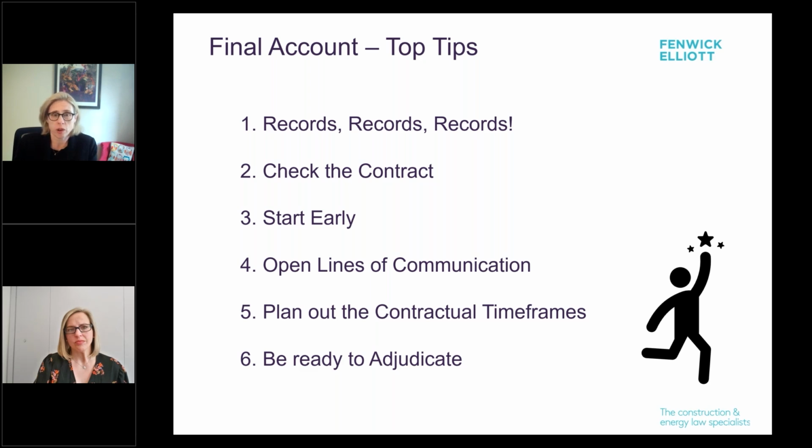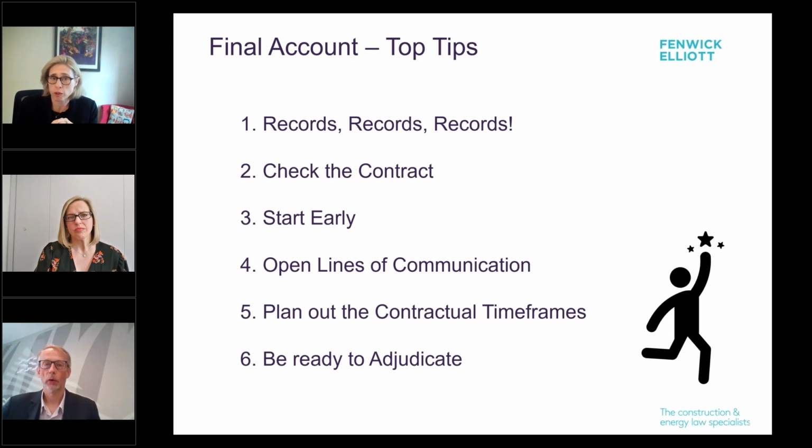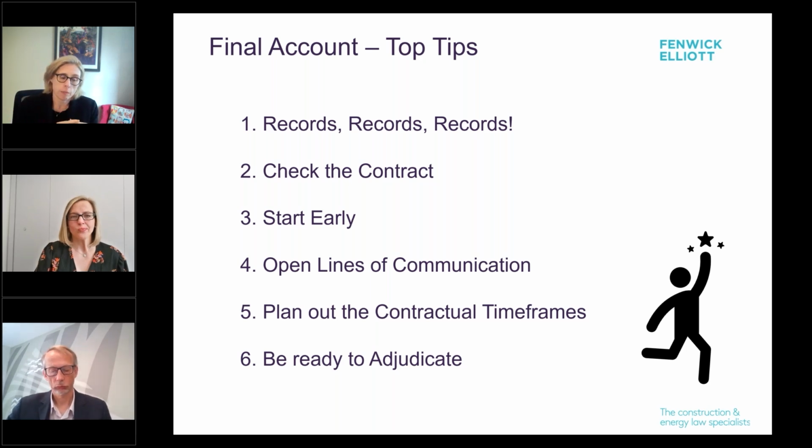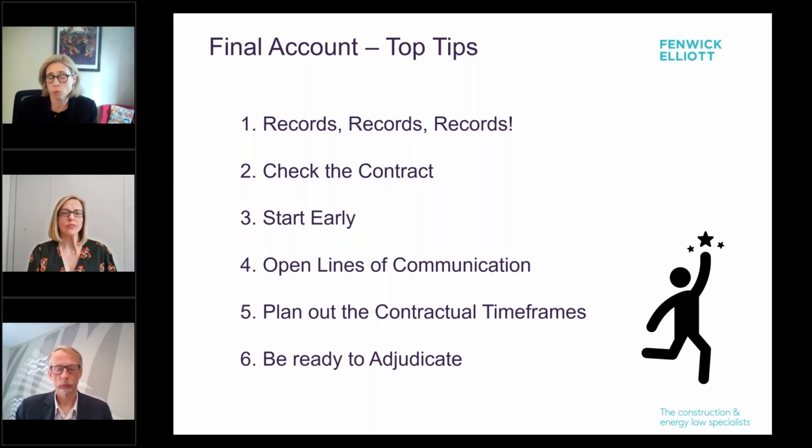Plan out your contractual timeframes. So Katherine's obviously set out the JCT ones that you need to be really aware of. NEC equally, there are strict deadlines and they will be enforced by the courts. Plan those out, be ready for them. And then number 6, be ready to adjudicate. Now, obviously, nobody wants to adjudicate. We're all hoping we won't have to. But if you've got a conclusive evidence provision and the option is adjudicate or be £1 million short, or even more than that, you need to be ready, because 3 weeks to prepare something like that, for example, in the NEC, is not that long, and it will be putting you at a disadvantage if you haven't done your homework in advance. So with that in mind, hand to Jeremy.